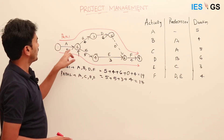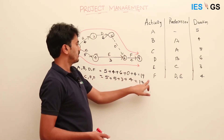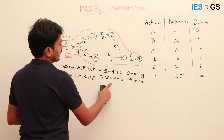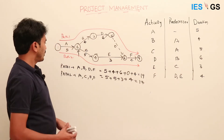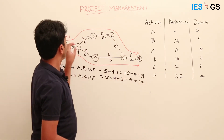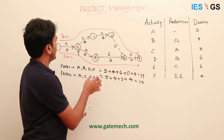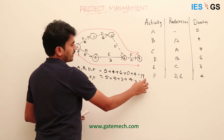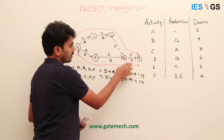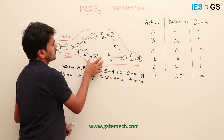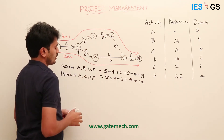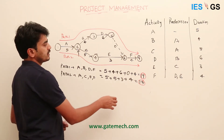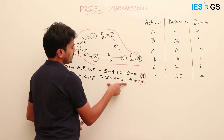Path 1 consisting of activities A, B, D, and F takes 19 days, and Path 2 consisting of activities A, C, E, and F takes 17 days. The project must have all activities completed by the project completion date. Since Path 1 takes 19 days and Path 2 only 17 days, Path 2 activities can be accommodated in parallel. Therefore, completing all project activities takes 19 days.